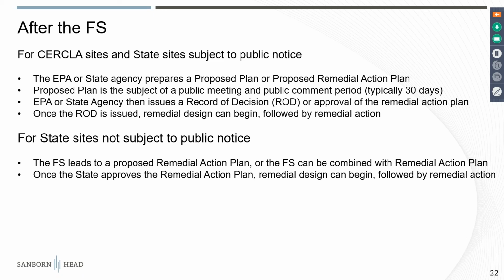But as I'll get to later in the lessons learned, it's really important to actually get to the public before this happens, because you want to have the public engaged in the alternatives you're evaluating before it's necessarily official. At many of the sites I've been involved in, I've gone through the FS process, and it's been very helpful to have engaged the public ahead of the proposed plan or the proposed remedial action plan coming out, so that it's not a surprise. They feel like they've had some contribution or some questions that they could have asked along the way, and that their input has been considered in putting this